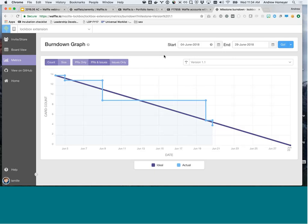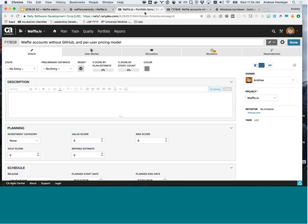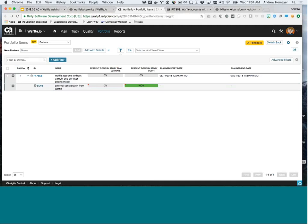And we're just coming through the last of the questions, see if there's a couple more we can tackle altogether. Cool. I saw a couple of questions around the EC within Agile Central. So let's talk about that for a second. So this EC is an external contribution. One question was around like where the size comes from. This is all roll-up driven. So these can only be interacted with through the API. So it's waffle telling Agile Central that this EC has, say, ten points with five points completed staying for the cap. So an EC is truly an external contribution coming from a different place. So all the points and the percent done is contributed from like to the API by waffle. So you can't set anything directly within Agile Central. It's just through that API. It does live as a child of a feature. So if you did have other user stories under this feature, you will see that external contribution at the top of the list and then user stories appears next to it. So that's how you will see work contributed from waffle aligned with other user stories that were worked on by other teams. They would be side by side. But only one external contribution would exist for all the work in waffle. So even if you had three cards inside waffle contributing to the feature, you will see one external contribution encapsulating that contribution from all that work inside waffle.